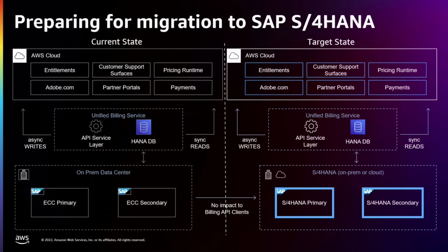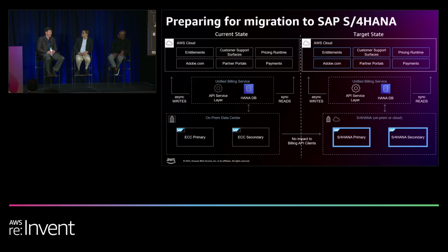The one other thing I would call out on that S4 journey is the downtime that comes with the migration of the data. This way you obviously have the availability solved for the customer impact, so you can have the extended downtime. And one of the lessons learned: put some thought into which of your processes are truly read and which ones have a write component or update.